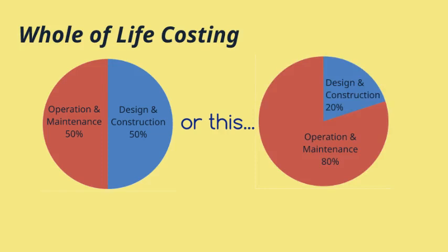So the whole-of-life costing is especially important for any client who has to manage the product produced after the project ends. For example, a building developer who will own and manage a building for 30 or 40 years after the construction project is finished, or a government type client who owns the building or product. It is quite a common occurrence where a project will spend more on the project costs in order to save money on the long-term running costs.